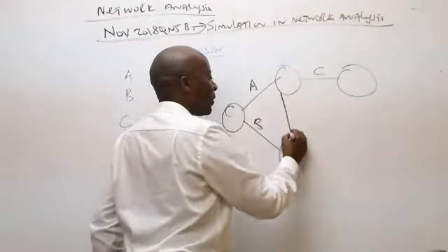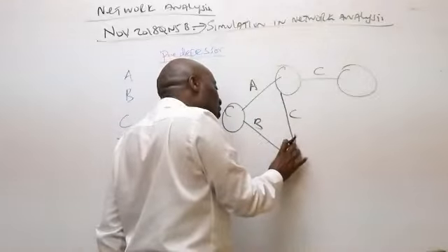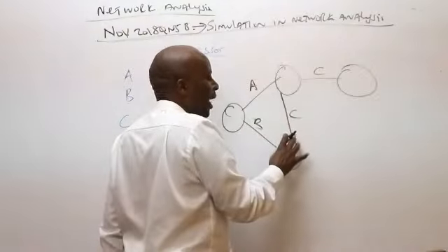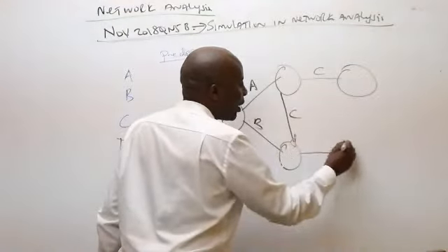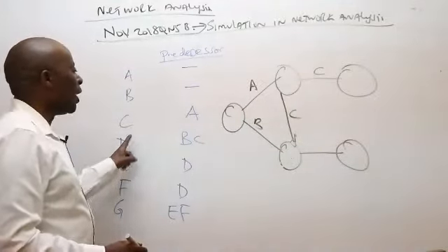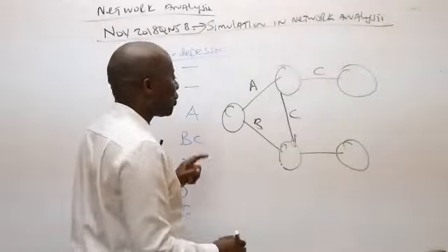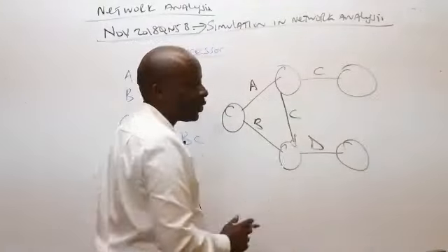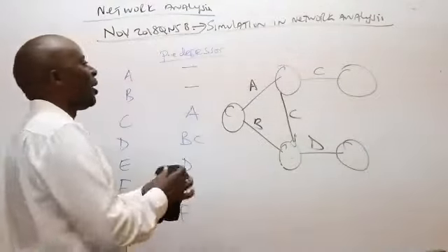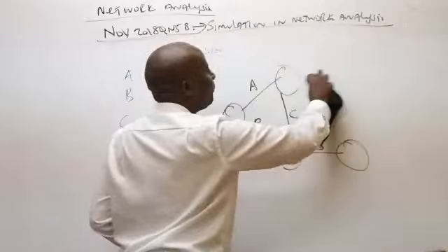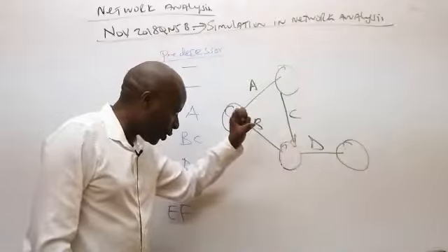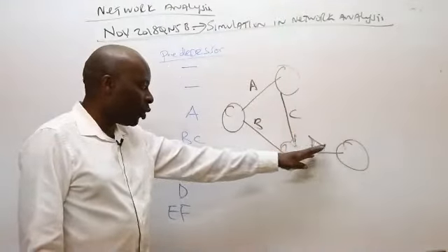You can drop C there, so that this node signifies the end of B and C. After the two have ended together, you can now pull an activity called D, which comes after B and C. Now I need to comfortably rub the old C. We rub it like that. That's D, which is dependent on two activities ending jointly for D to start.